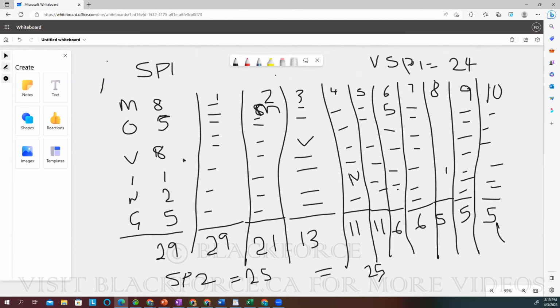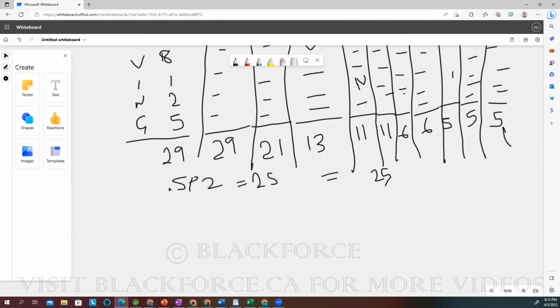So remember we said sprint 1 is 24. We now have sprint 2. We took in 25. We finished 25, right? So now let's say in sprint 3, we decided to take in 28. Maybe the team said, because in sprint 2, when we took in 25, we finished the whole 25 and we still have a bit of capacity, right? So they took in 28. So if they take in 28 and they finish that sprint 3 and they got a 25, right?